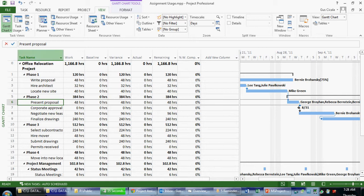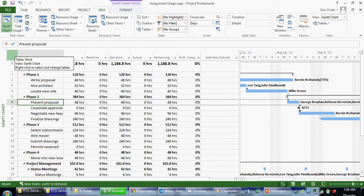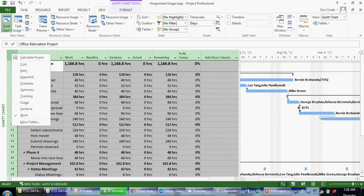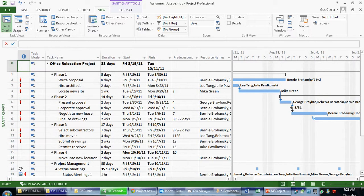The other way we can apply a table is to right mouse click above the ID column or to the left of the column names. It's just a blank little column here. If I right mouse click here, it gives me a list of tables. The default is called entry.